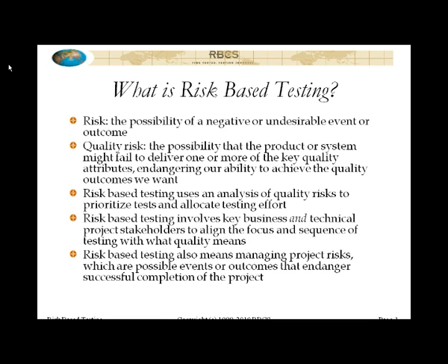So you think about things that could affect our ability to carry out the project as planned. Loss of a key project team member, like your best tester quits. That's a project risk. Or test environments not available when needed. That's also another typical testing-related project risk. So certainly we want to identify and manage those risks, but that's going to be done in the test plan, and that's not really what risk-based testing is or should be focused on.